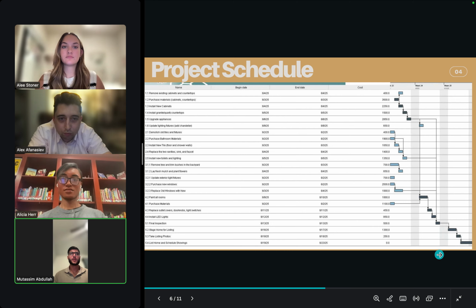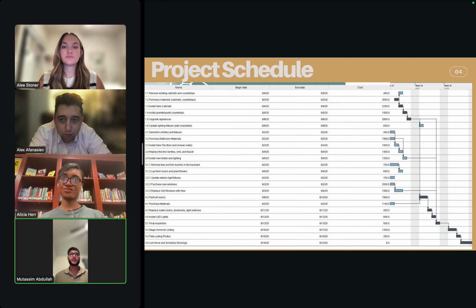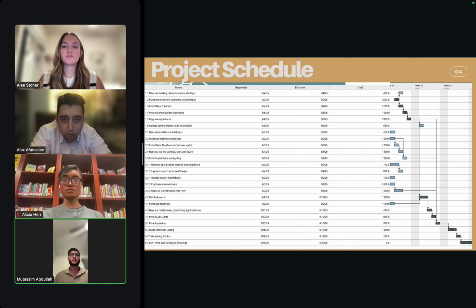Thank you, Alicia. For our project schedule, this was developed directly from the network logic and reflects all task dependencies and durations. We use logical sequencing to ensure efficient flow. For example, granite countertop installation only starts after cabinets are installed. We also took advantage of parallel tasks where possible. For instance, landscaping 3.1 happened while interior touch-ups 4.0 were being completed. We scheduled work sequentially unless there was clear opportunity to overlap without conflict. This gave us a practical and achievable timeline that aligns with our overall WBS.